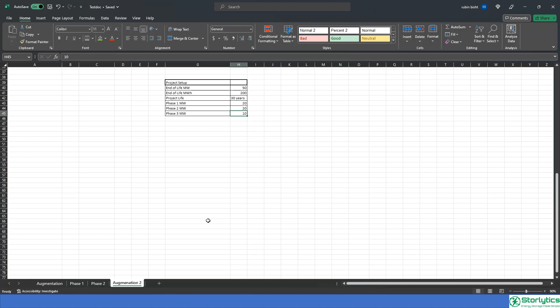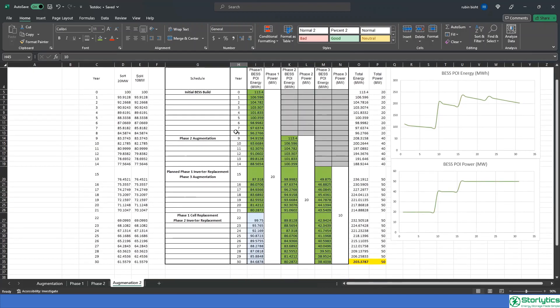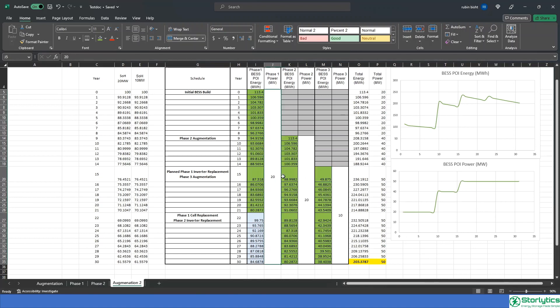In the final augmentation sheet, we can see that each augmentation cycle can be aligned with the scheduled replacements or installed to reduce downtime of the plant.